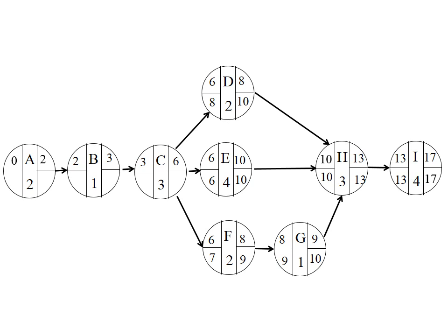Okay, now when is the latest you will allow C to get completed? Is it 6, 7, or 8? The answer is 8. No, answer is not 8. I just said it wrong. The answer is 6. When you are working backward, you have to select the smallest number. Because if you put down 8 there, what happens? You will complete activity C at 8. Can you begin F or E at 6 and 7? No. So you have to put down 6 here. Working backward, you always select the smallest number, and you can figure out the rest in this fashion.